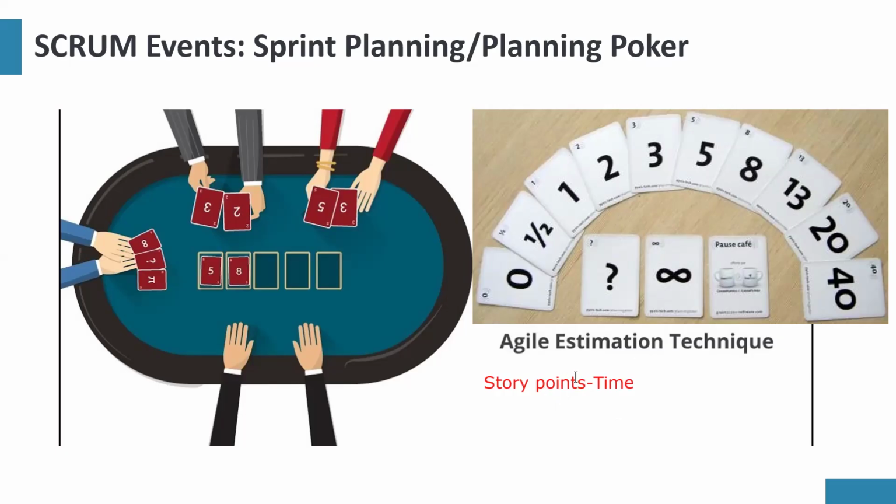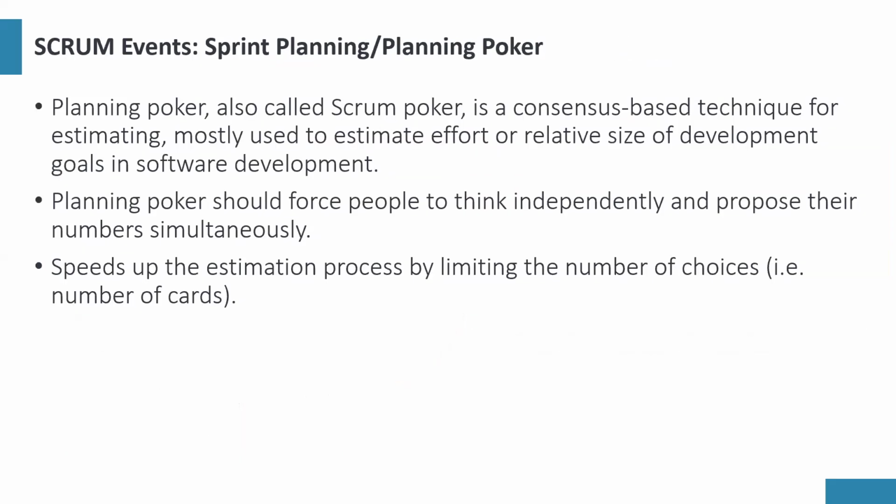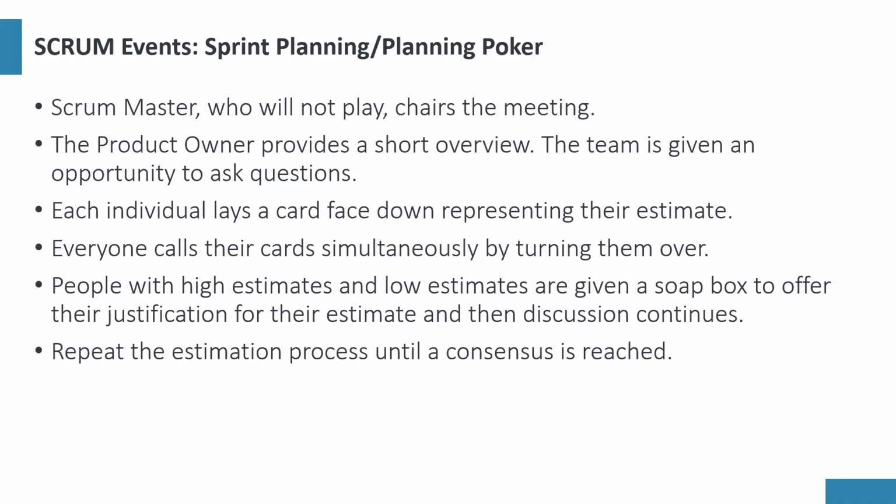And the reason they use story points is because you cannot directly convert it to time. So if they say it is 8 story points, it's 8 story points. When are you going to finish? We'll finish it when we finish. But there's something I'm going to show you that will help us to know how to measure the story points. And that is called velocity.